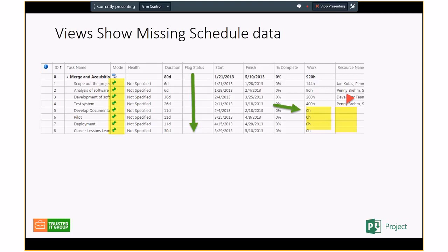So a notification could be: you've got a project schedule, you're in this phase, you don't have anybody assigned. Maybe you don't know who that person is, and perhaps you need to put a generic in there. But if your PMO governance says you're going to have somebody assigned, then this would be a violation of that, and so the project manager could be reminded to fix his project schedule.